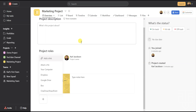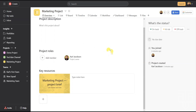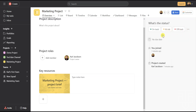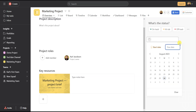The last part of this menu is the Status section. This is where you can indicate if a project is on track, at risk, or off track — just click on the one that applies. Once the project is complete, you can click on the three dots and select Complete Project. From there, you can also see the project due date, or if there's no due date, you can click here and assign one.